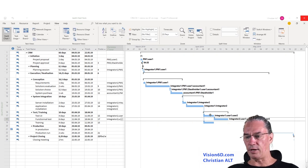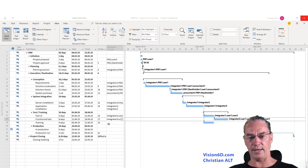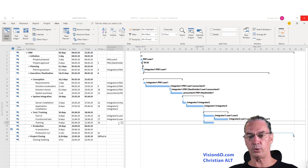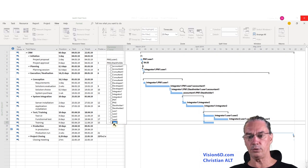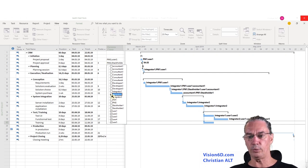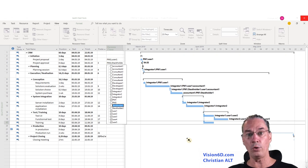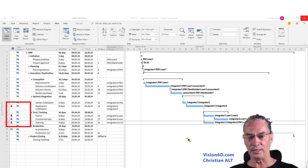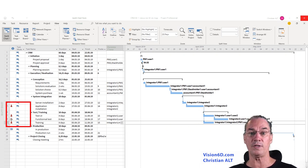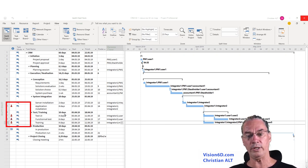We have all the people and resources involved in the tests. Now what about the training? Everyone should take part in the training — all the users, integrator 2, integrator 1. I think it's really good that the project manager also participates in the training. So we have all this defined, but MS Project is flagging that people are over-allocated, so we need to solve this.